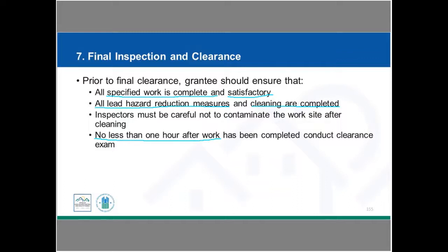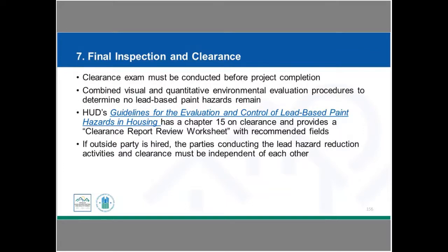So for instance, when we were talking about, well, if we could complete the work within an 8-hour work day, we could leave the occupants in place. That includes the clearance testing. And so we have to time into that. We have at least an hour once all of the work has been done in our cleanup to make sure that all of the dust is settled and so that we'll have accurate testing on that. So that kind of factors into our timeline a bit for that project.